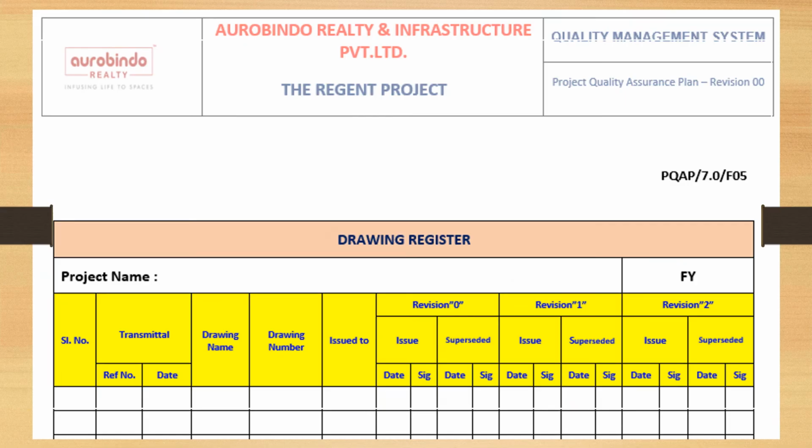This is the format for the drawing register made as per our quality manual. Here we need to maintain the issuance of drawings, and the withdrawal of superseded drawings needs to be recorded and monitored as per this format only.